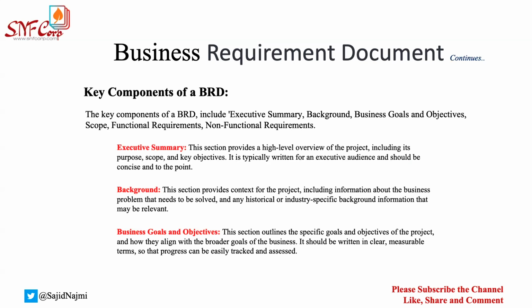Now you may ask, we are in the process of requirement gathering. How would we know how much time it is going to take? We don't know what the requirement is all about. We'll have to analyze things and see. That's true. It's a ballpark effort, right? It has like minus plus 75% variation, somewhere minus plus 50% variation, somewhere minus plus 25% variation. So you always have that variation in place when you're giving a high-level, helicopter view of those assessments of how long it's going to take. It's like a ballpark effort, not a final effort.